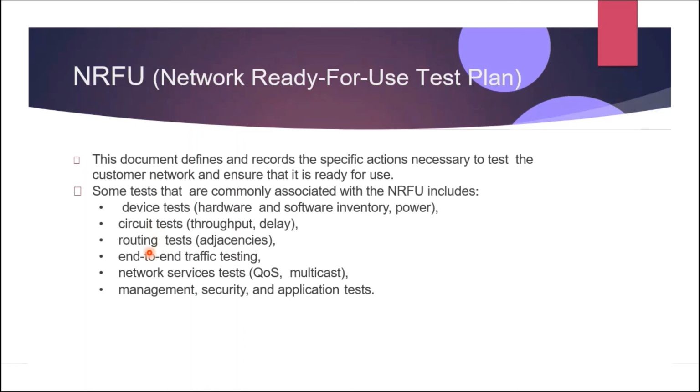You also have to perform some sort of routing tests: adjacencies, routing table consistency; traffic tests, end-to-end traffic testing; the network service tests like the multicast, the quality of service, WAN acceleration. You also have to perform application testing, management, network management software, and security tests.